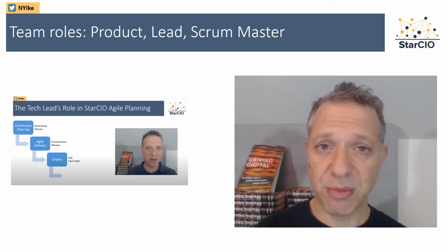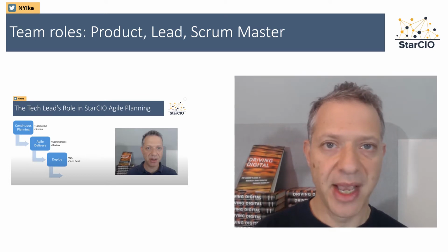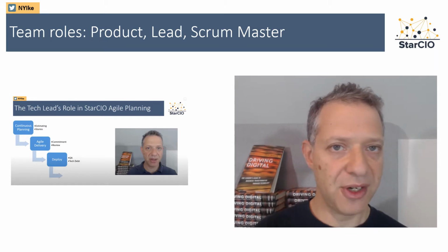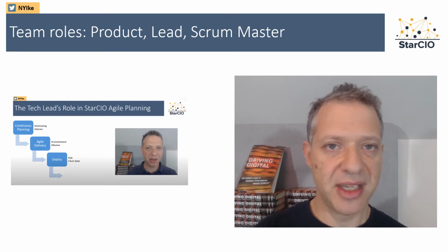Tech leads are the first person looking at stories and epics and features and making sure they're going to be cleared to the team. And the tech lead leads all forms of estimating, first by himself or herself around what I call stubs, and then later on with the team in terms of actual sizing stories.